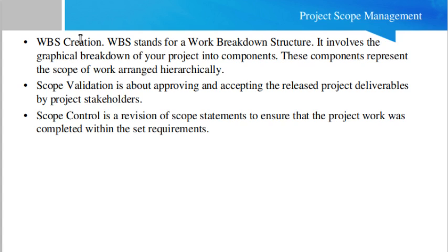Whenever we talk about scope, it's a very broad term. So we have to divide the scope of a project into smaller pieces so that we can estimate, control and manage the scope of work. Remember, friends, you will divide the scope until you reach a level at which we can estimate the tasks and activities. So that is the concept of WBS creation.